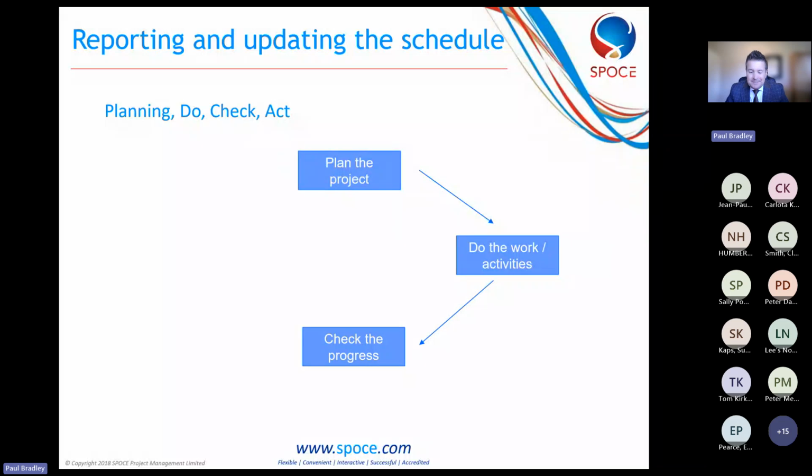As a result of that, we need to check the progress. Are we on track according to what the plan says? It needs to be according to what the plan says because that's what's been approved. There's a phrase that I often use, which is the tail wagging the dog. We don't want to be in a situation with the tail wagging the dog. The plan is the dog and it needs to wag the tail. Okay, so essentially we have this plan so that we know what we're supposed to be doing. All too often I see plans that are updated to show what's actually happening, and we'll just make the plan fit in terms of what we've done, and that's not really how it should be. It should be the other way around, with the plan driving the activity.